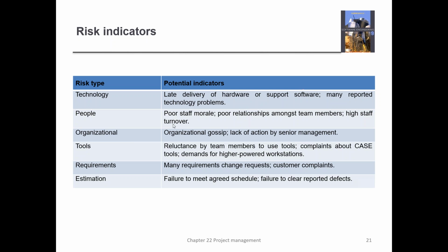Okay. Then you have the issue with tools. Reluctance by team members to use the tools that they're given. Complaints about CASE tools, and these are tools that help you in the development of your software. And there are demands for higher power workstations. So these are your indicators regarding tool risks. Your staff don't want to use the tools that you're giving them, they're saying they're just not good enough. Then you may have a problem there.